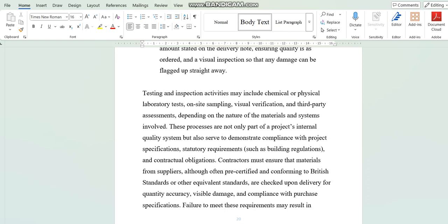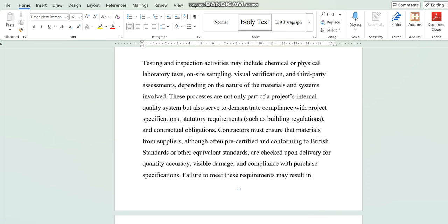Which means to inspect whether the things that are being brought into the site or installed are actually according to their standards. Or then, of course, there will be certain specific materials that they will ask for testing, or certain particular systems that they will ask for testing first. For example, maybe bar from China, pillar hydrant from certain countries, not made in Malaysia. Sometimes it's mechanical, M&E parts, that they actually have to import from overseas. And they want to make sure that it's up to certain standards or up to local standards, then they'll call for testing.